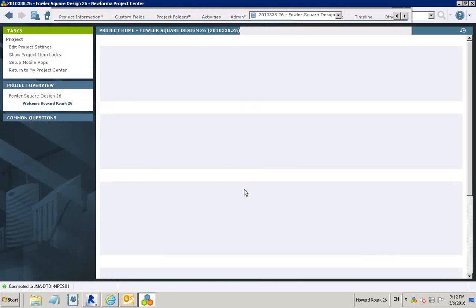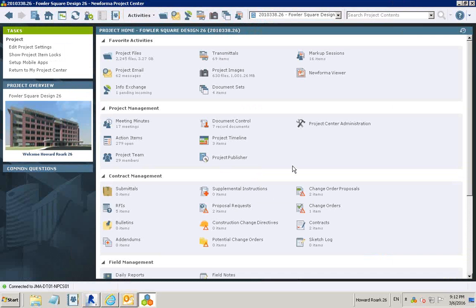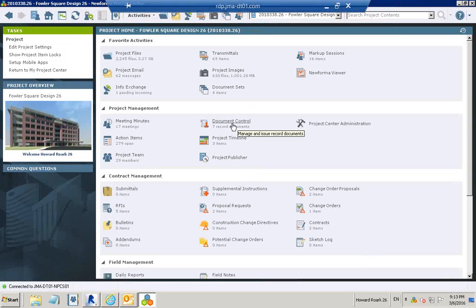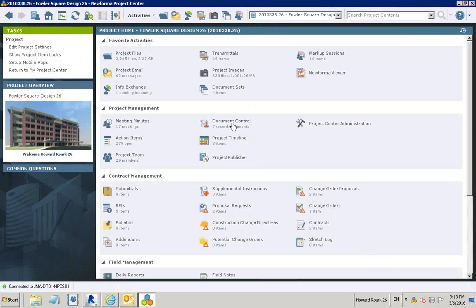For the project. Okay, Mark. So typically. Yeah, go ahead. Typically, when we're about to start construction on a job, and we hand it over to our contract admin guys, we probably want to create record documents because drawing issues can change throughout the construction phase. So correct. We'll just start with the current issues. New Forma won't know of any back issues, but that's probably not a big deal for us for those sorts of jobs.